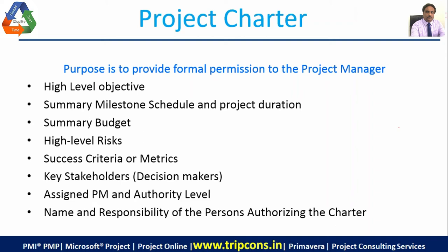Once you have started the resource mobilization, you do the work and finish it on time. Every milestone has an agreed upon time and deliverable. It's not about the entire project. Even within the project, you have time constraints at milestones. He says, I want the ground floor within the next 6 months. You say, fine. So you put a date on that. When you deliver him the complete ground floor with acceptance, he pays you the balance $80 million. So that adds up to $100 million of the first payment. So that is the milestone.